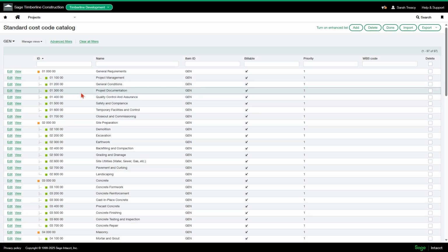And most people will be familiar with cost codes. They'll already have a standard list that they are familiar with using, and you can just bring in that list as it is. We may tweak it a little bit or just keep it exactly the same depending on what you want. But cost codes essentially are a way to break down your costs associated with each project. So you can follow the CSI standard, the CSI master list. There's 50 different divisions on that list, and it makes up thousands and thousands of cost codes. So you could pull from that.